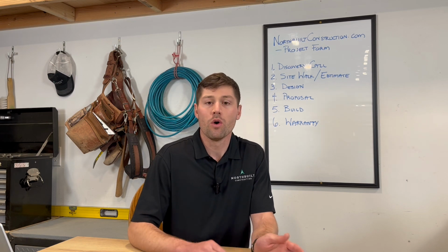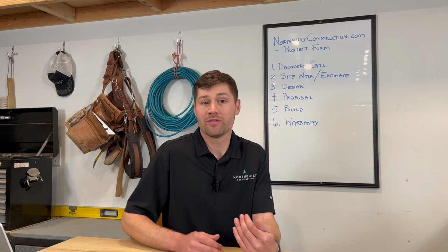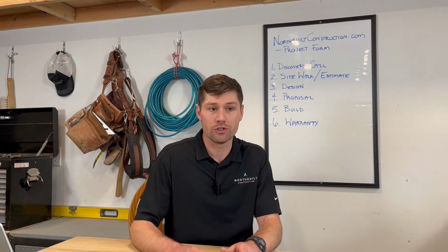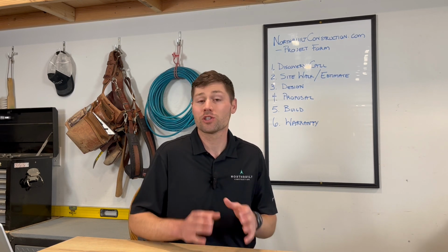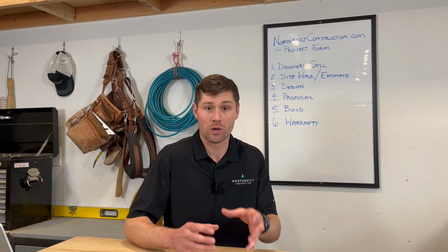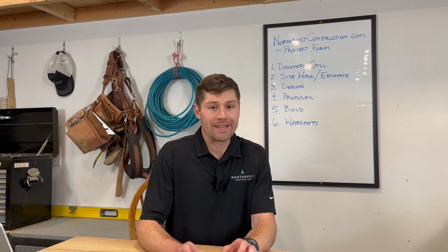After that, we'll do either one of 2 things. We'll either come out for a site walk if we need to kind of further evaluate where things sit, or 2, we'll go to an estimate. Now, if you filled out a good project form and it's a bathroom and you send in some photos or we've talked it through and I've got a really good idea of what it is, we can get you an estimate with that information being like, hey, this is where we're gonna sit, is that okay? Are you okay with that? And from that estimate, we will move into the design phase.